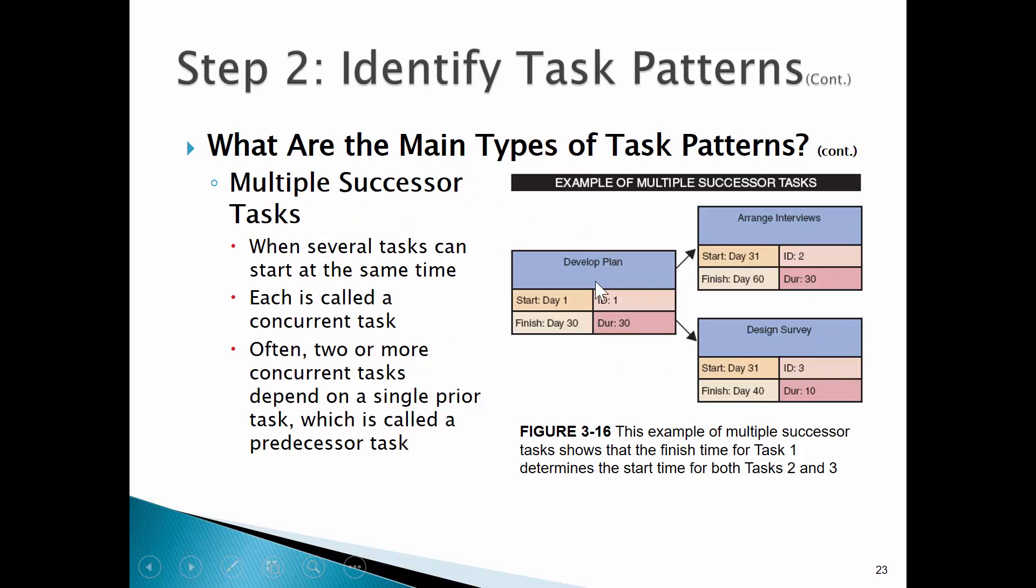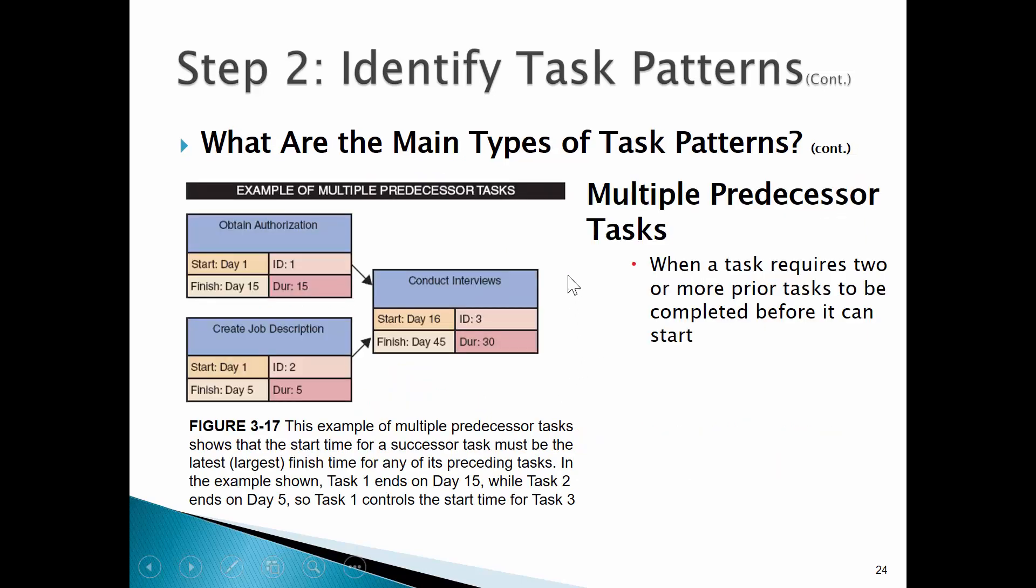One of the things I'll explain in that video about creating a PERT CPM chart is make sure you count on your fingers. What I mean by that is whatever the finish day is of one task, we can't start the next task until the next day. What are main types of task patterns? Dependent tasks - prepare outline, create document. We need to prepare the outline before we can create the document. Multiple successor tasks - develop a plan, but we can arrange interviews and start designing the survey at the same time. Predecessor tasks - before we can conduct interviews, we have to obtain authorization and create a job description.